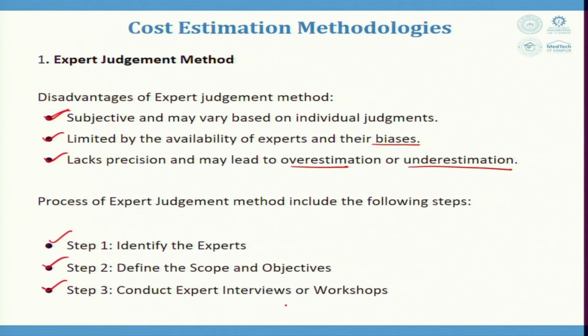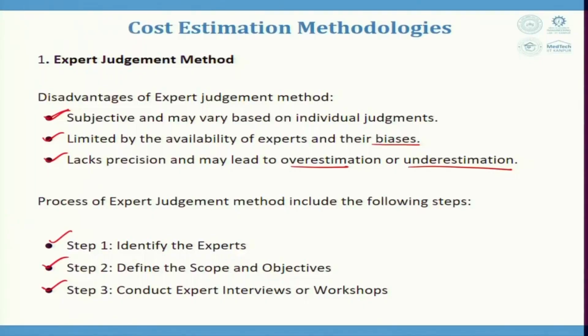So, sometimes individual interviews are taken, their judgments are put onto paper, and whatever common things are there are taken. This is all analyzed by a central person who is known as the facilitator. Sometimes the judgments are taken blindfolded, that means experts won't know each other or communicate with each other. Most of the time they are called upon on a single platform at a single time, that is, a combined or collective meeting is called. So, conduct expert interviews or workshops to collect the data.